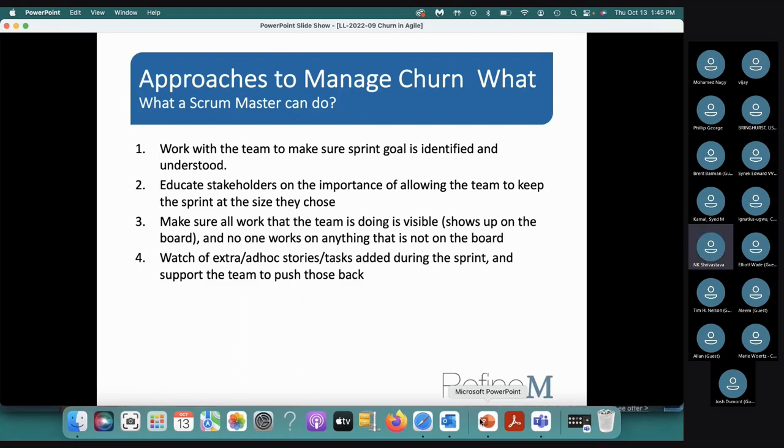And once you have defined that, then as per the Scrum, I'm talking about the Scrum method, if you keep changing your scope of work, then you really don't know if the team is maturing or not, because all the metrics that you will use to demonstrate that will not show whether the team matured or not. So you will really not know what's going on. You will not know if the team is improving or not. Are they maturing in their agility or not?